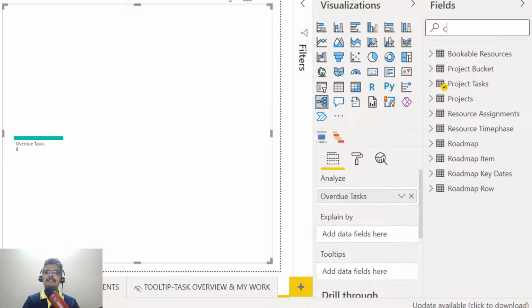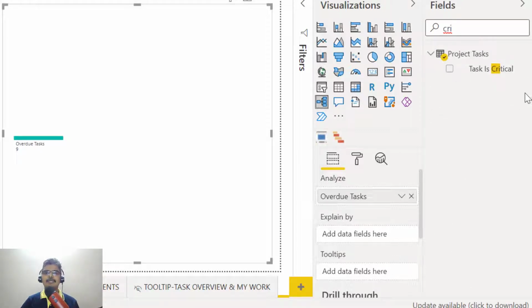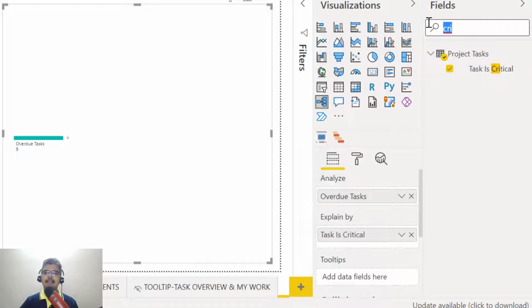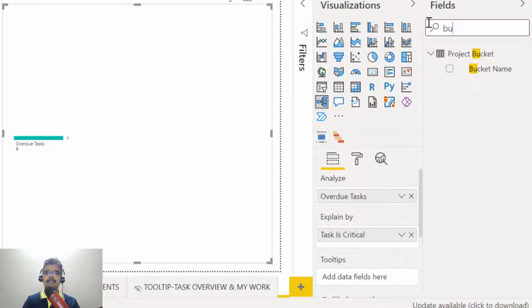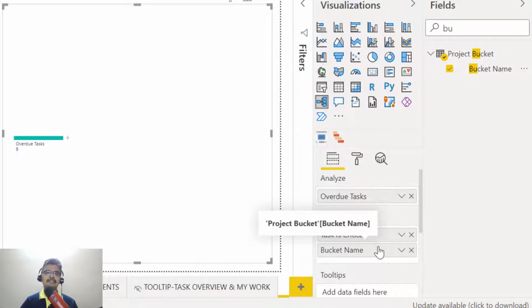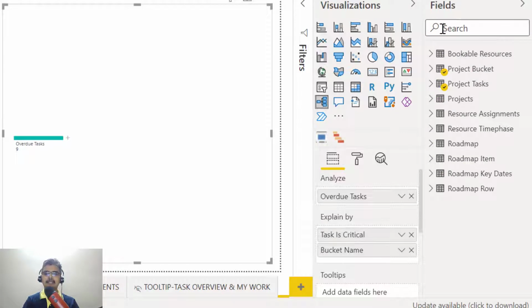So let me start with critical. When I use the word critical, it is not critical with respect to the customer. Rather, we say that if a task is critical and if it is going to be delayed further, it is naturally going to affect your project finish date. So I'm just going to bring this field into my explain by well. Next, let's bring in bucket. There could be many tasks in the same bucket, and that could be the reason why it is not getting a focus. Then I may want to bring in my team.